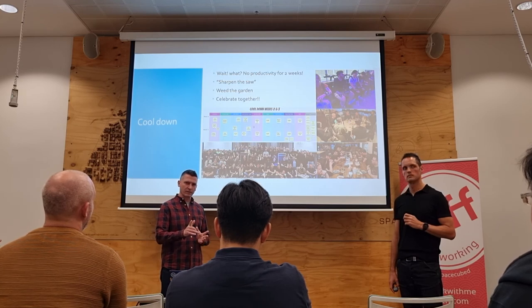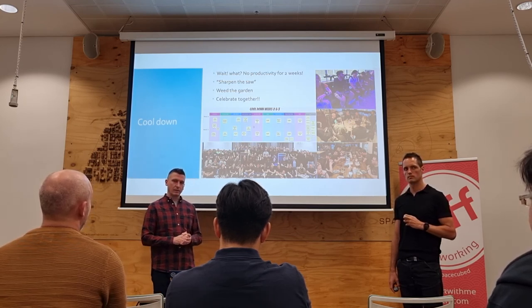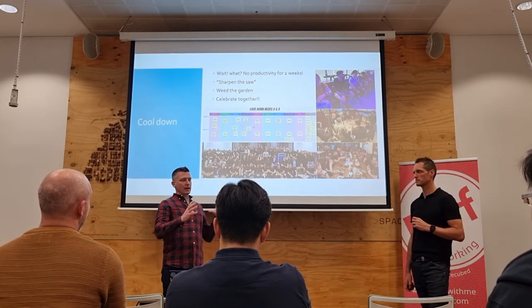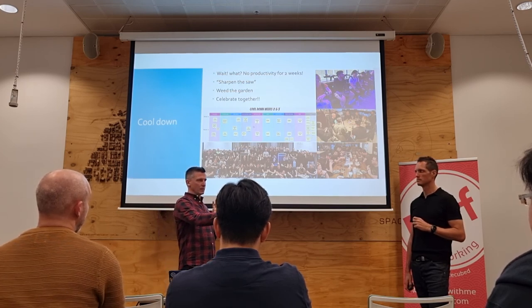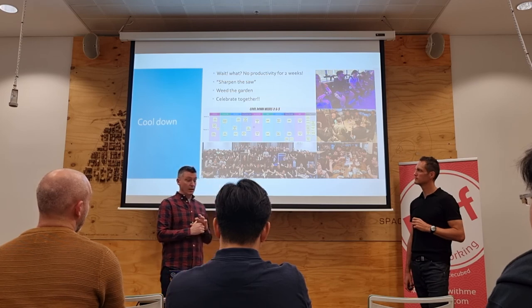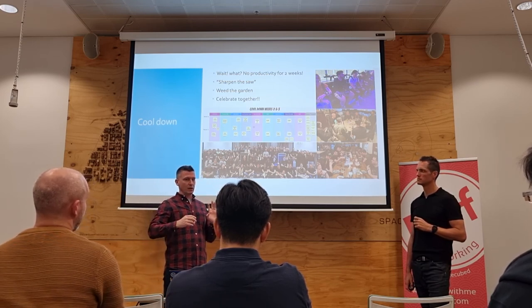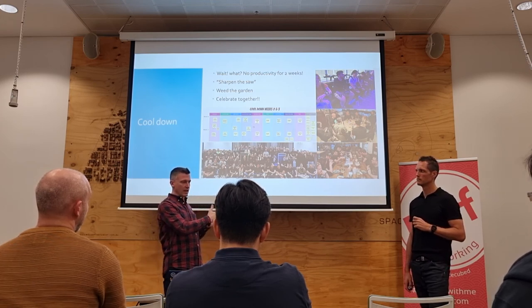What was the other part? If you have to apply the handbrake, how does the team pivot? How do you reprioritise what the team does? So when we plan and prioritise our cycle, and here's all the things we want to work on, we have a priority order. Priority one, priority two, it gets a bit fuzzy towards the end. If something had to drop because something else unforeseen came along, we know these two projects we're not going to drop, because those things need to happen regardless.